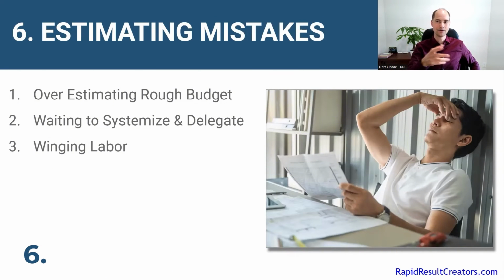And if you need to, ask someone who's there doing the job. If you've got carpenters or foremen or a project manager, they may be better suited to know how long something's going to take because they're not as invested in the business, and they don't have your mindset of get it done as quick as possible, and how you maybe did it 10 or 20 years ago when guys could fly through it. It's a different world now. You have different employees, stuff happens at a different pace, right? So getting someone closer to the front lines to double check on labor time or costs may be very helpful and will keep you from winging it and losing money.